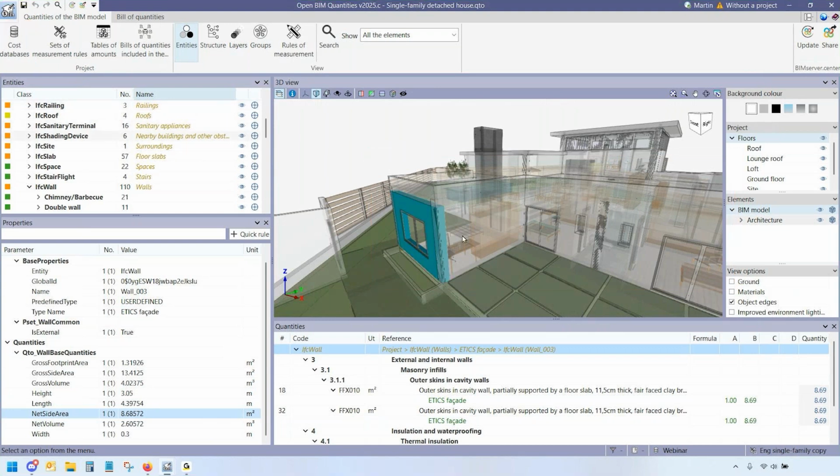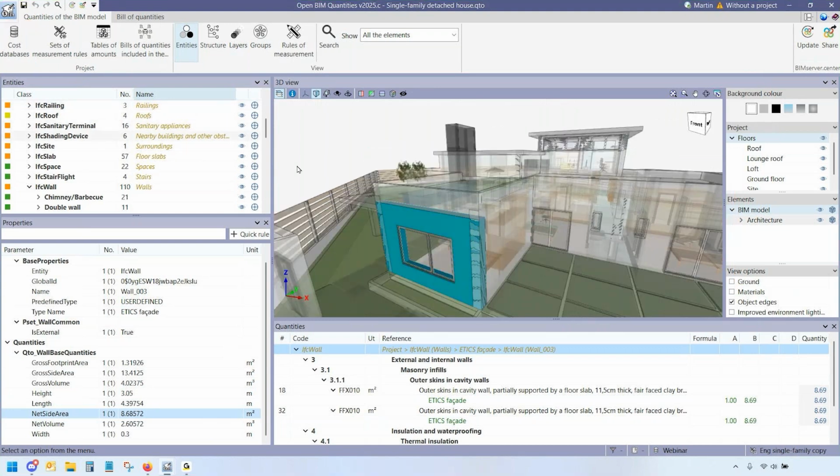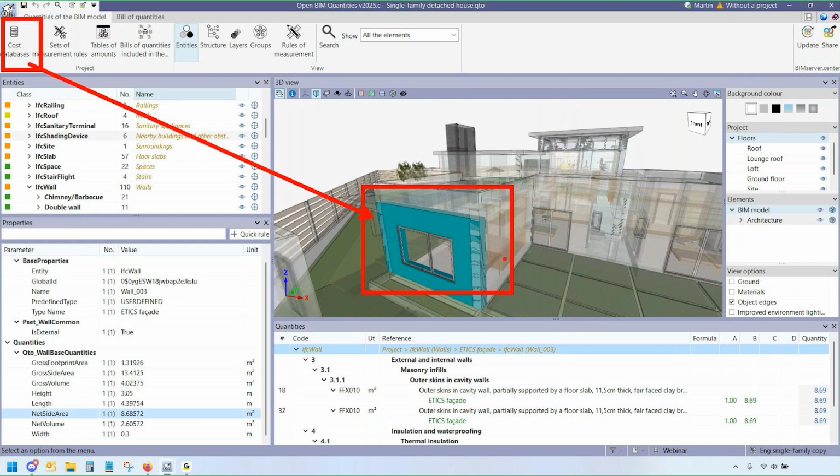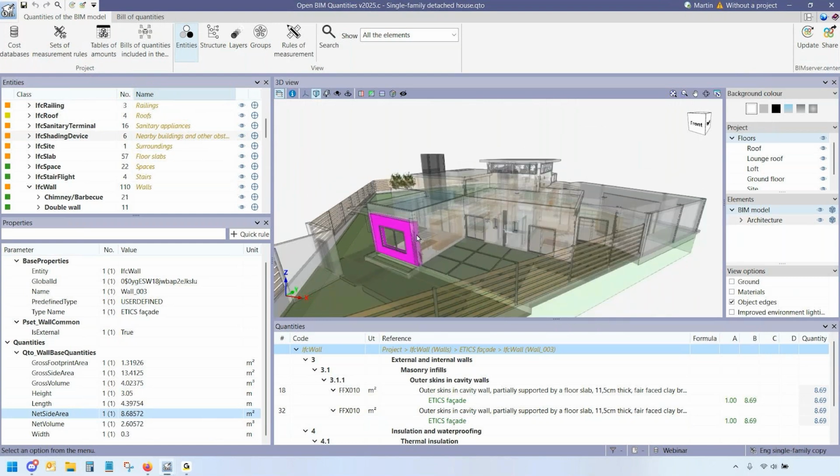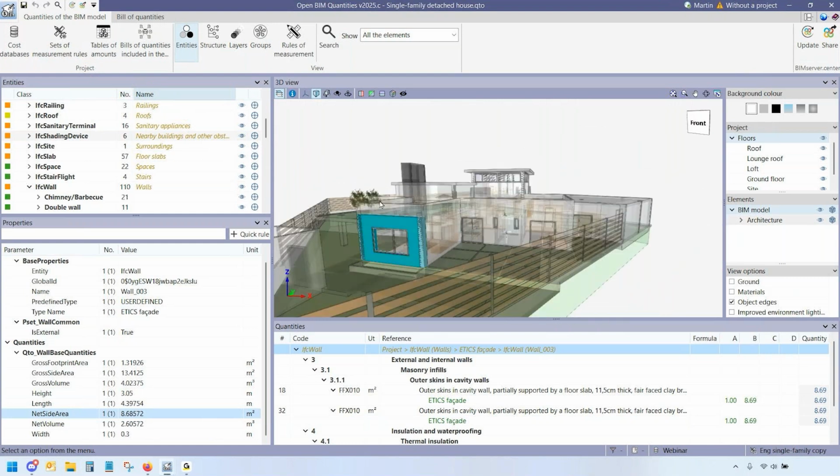So once we have the model and the codes database, we simply need to attach one specific solution present in the database to each specific element in the model. Actually, we may put many different solutions into one same element in the model. So this is what we'll do actually.